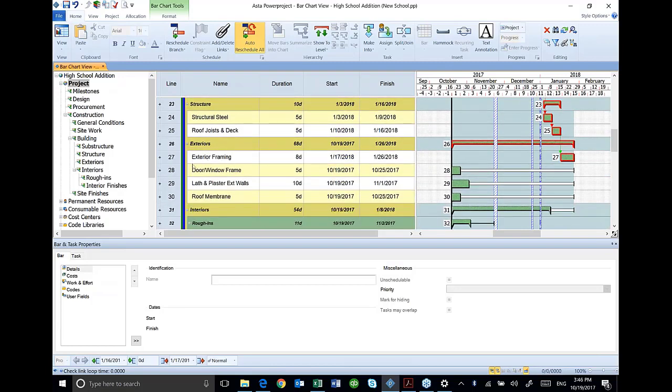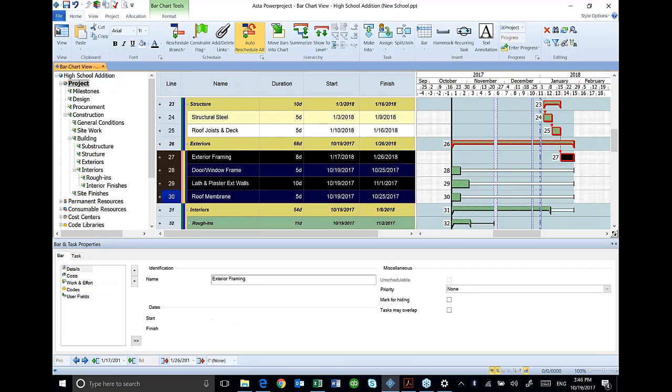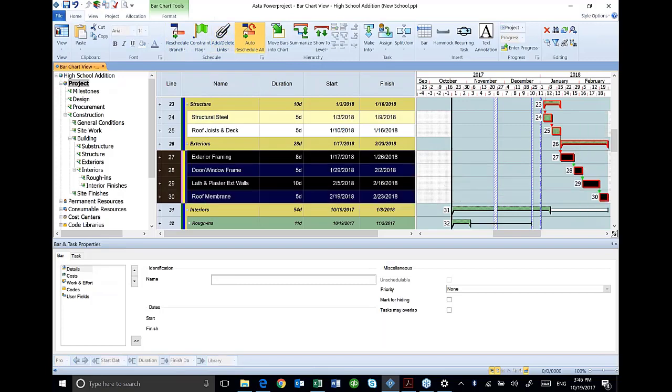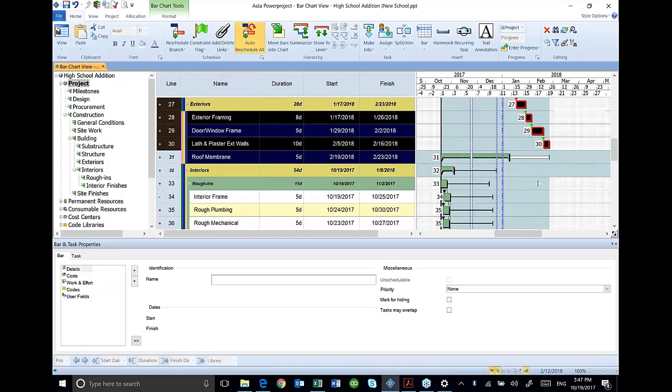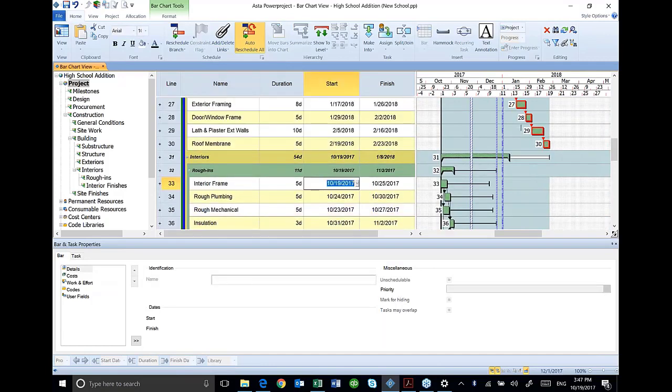I forgot to tie these. I'm going to highlight, hold, hold, hold, shift, and link these tasks. Forgot those when I passed through there. And my interior framing, I'm going to start that after exterior framing. So I make that logic tie.